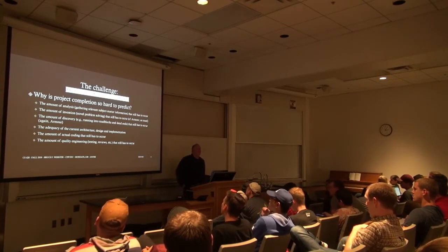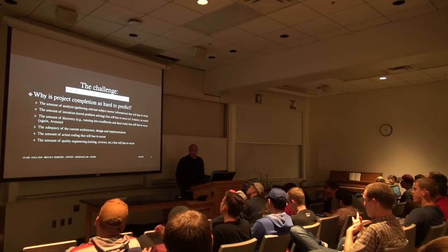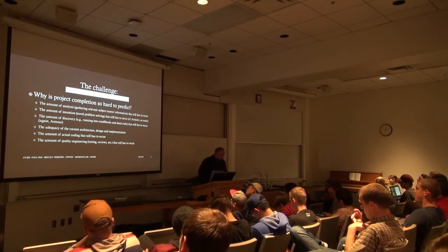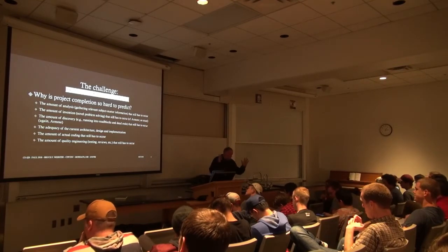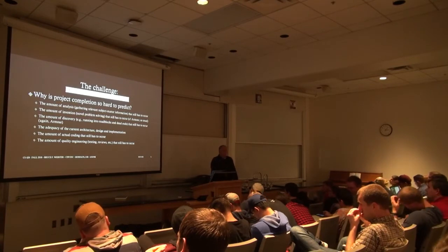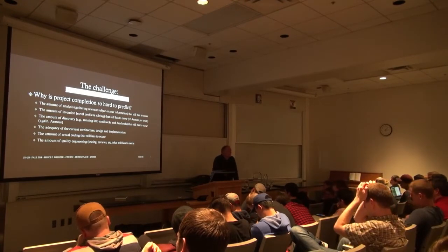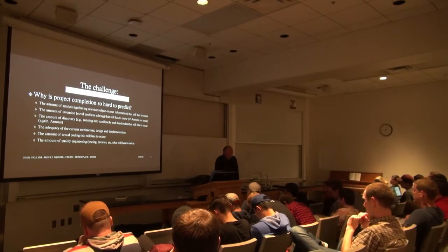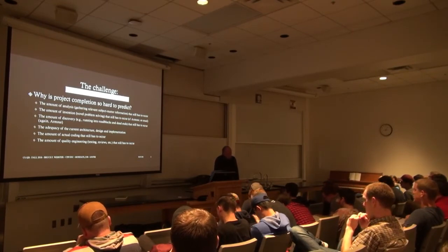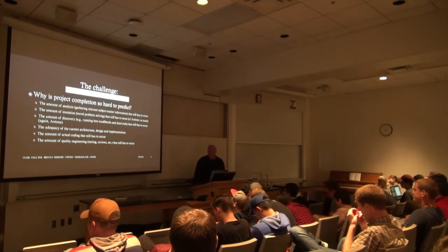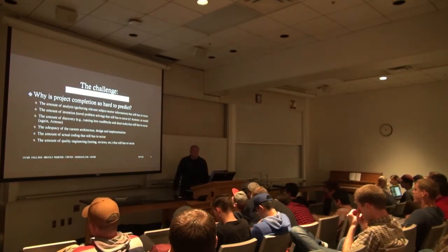This is the 3-week of testing fallacy. I've mentioned that before. When at Pages we closed on funding, brought Larry Spellhog on board, great CEO. I have tremendous respect for him. But like I said, I was trying to hire a director of quality. Larry said, can't you just hire some college students to test the last 3 weeks before we ship? It's like, no, Larry. That won't work at all. And we hired a director of quality, we hired full-time quality engineers, and they still were kept busy full-time for a year and a half.